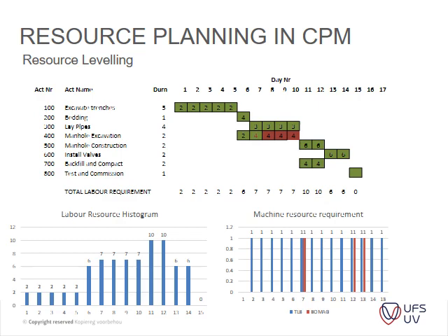Okay guys, so what we did was we basically did a bit of resource leveling. So instead of on day 7 where we required two TLBs, we replaced the required TLB and only used the TLB to lay the pipes. But if we don't use the TLB, it extends this manual excavation.